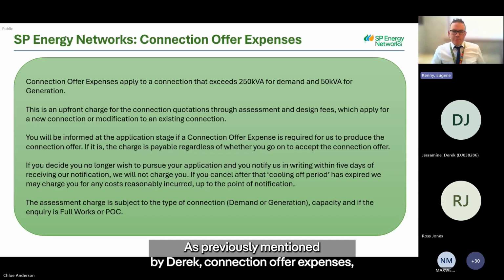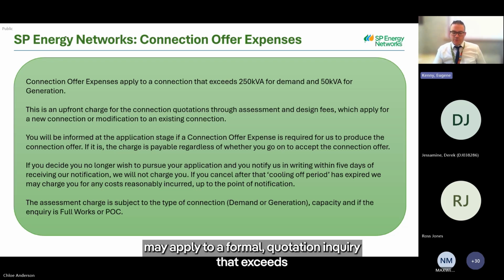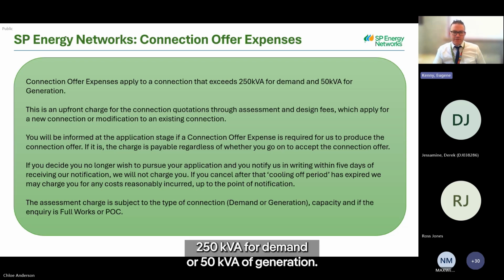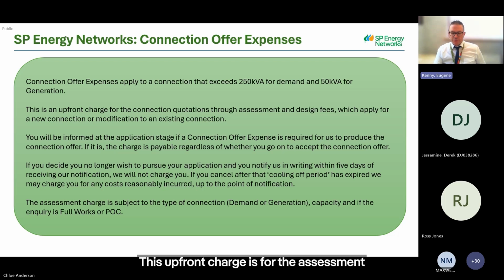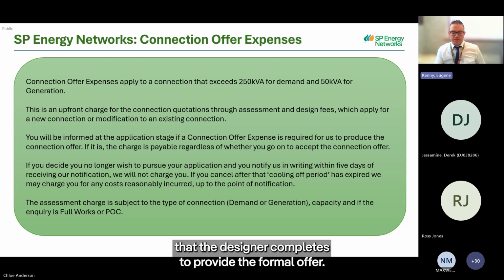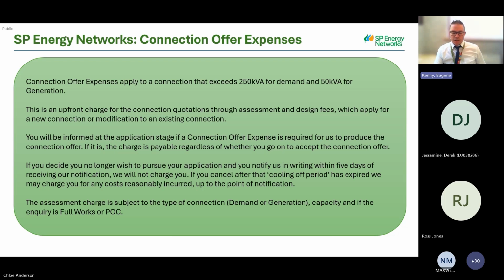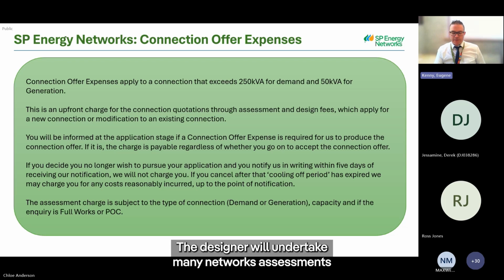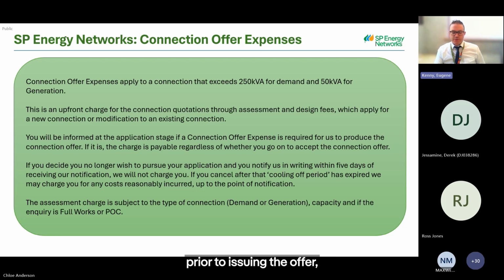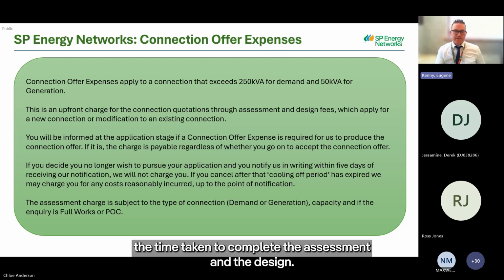As previously mentioned by Derek, connection offer expenses may apply to a formal quotation enquiry that exceeds 250 kVA for demand or 50 kVA of generation. This upfront charge is for the assessment and design of the proposed connection that the designer completes to provide the formal offer. The designer will undertake many network assessments prior to issuing the offer, and the connection offer expenses are to cover the time taken to complete the assessment and the design.